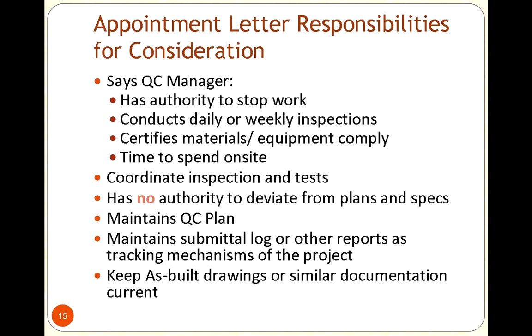Now, he cannot tell you to paint it blue or red. It just has to be a fire-retardant paint. But he has the right to do that. But this guy would come to me and say, hey, I just stopped the work for A, B, and C. What do you want to do next? And so we would go back to what the scope of work was that everybody had agreed on and said, okay, it does not say the color, but it does say that it has to be this type of fire-resistant paint. So contractors, I had the authority to go back and say, now contractor, you need to do this. You skip this step. So you deviated from the plan, you deviated from the spec, you need to go back and take care of it.